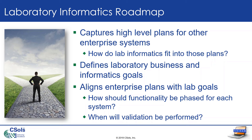We're also going to define our goals for the business and for informatics generally and in the lab. We want to make sure that any enterprise plans align with the lab — for example, if we know we're going to phase out SAP QM, then we know the LIMS needs to fill the gap of building and printing those certificates of analysis. We also need to think about when validation will be performed. This is a big piece for regulated firms and regulated labs, and we need to plan for it, plan for resources, and understand how it fits into our enterprise planning.